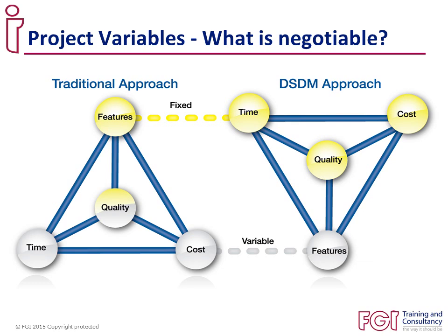Having seen then that Agile has a different philosophy towards how work happens over the more traditional approach to projects, there are a number of concepts to help us work in this way. One of the major changes is the way we approach the project variables of time, cost, quality and features, commonly regarded as the iron triangle of project management. The triangle on the left for traditional projects shows that time, cost, and sometimes quality can vary, so we can deliver all of the features we have been asked for.